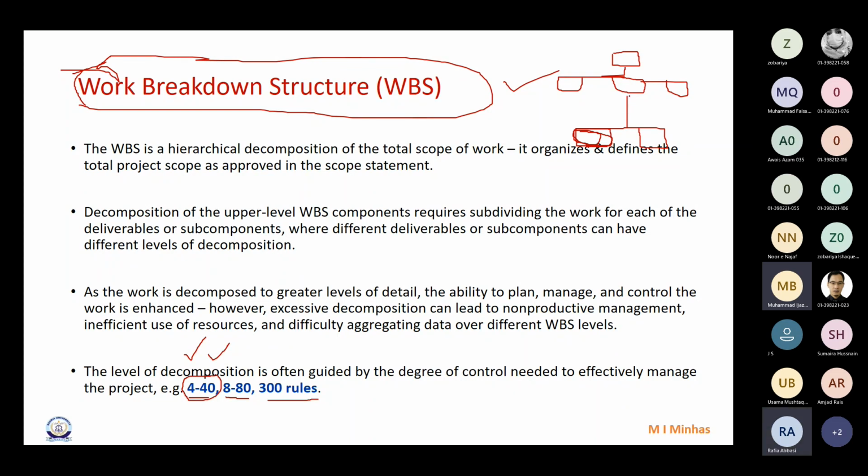If we have broken down a bigger piece of work into a smaller one where estimation and planning are easier, and we can just appoint a work package manager who would look after this piece of work, and monitoring and controlling is easy, then planning, execution, and controlling all become easy, and you stop further breaking down the work. This level is called the work package level.